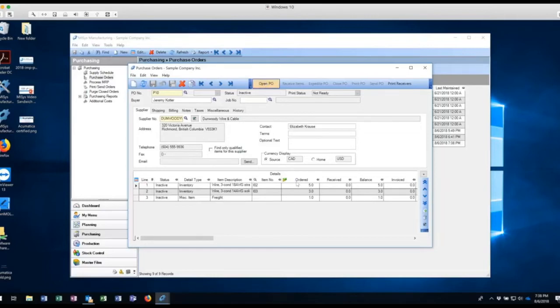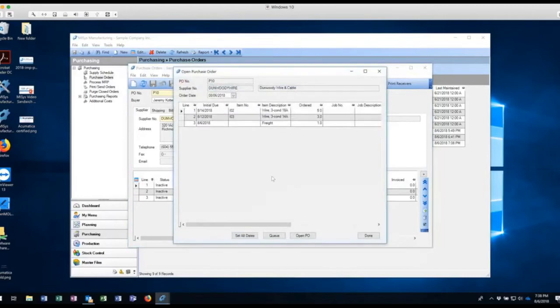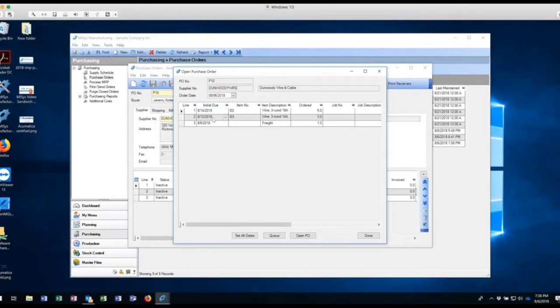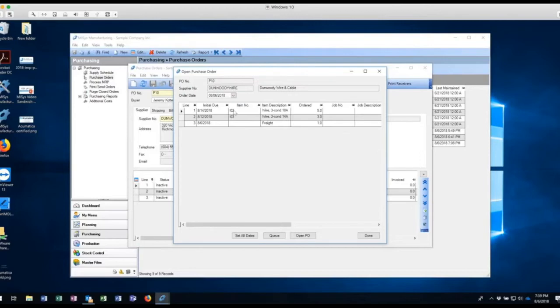Okay. So let's go and open this PO and here I have my three items. Notice, this is today's date, but notice that the initial due dates are different. Well, same thing as the price and the purchasing unit of measure. I also have a lead time for this vendor, for this item set up in MISIS. And so what that does is allows MISIS to say, okay, based on the lead time, this is when you can get this product. This is when you can get this product.